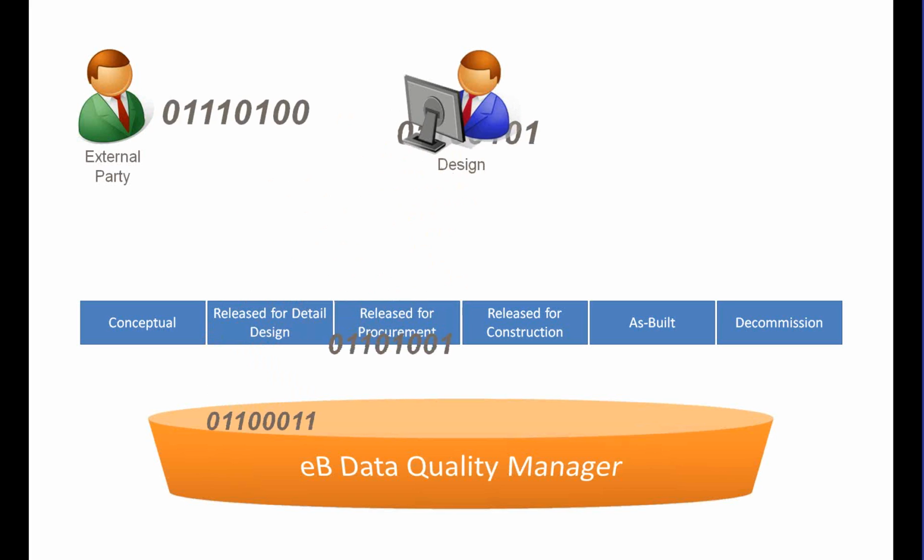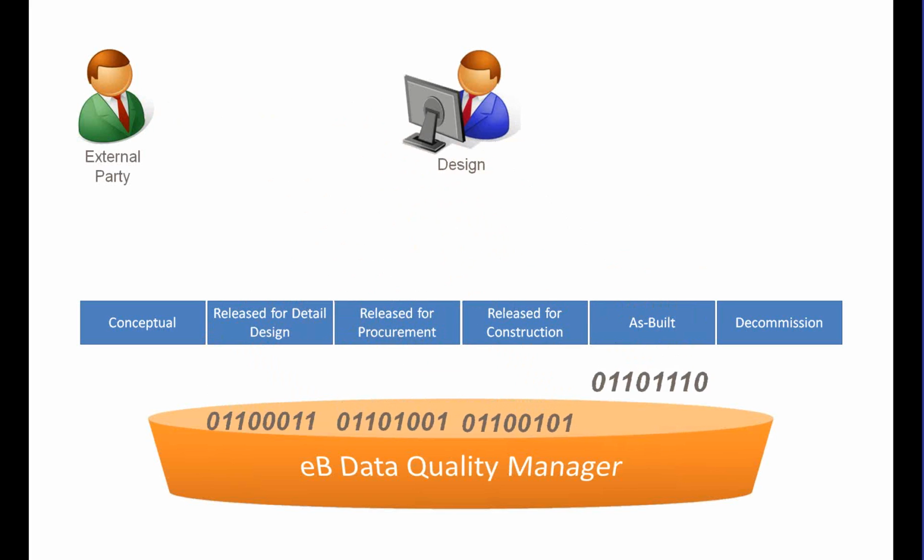And we receive information as early as we can in the design process. And instead of creating a bucket of information that is handed over at commissioning as built to a facility, we manage a pool of data in the EB Data Quality Manager through a design execution process, and our goal is seamless handover to our facilities.